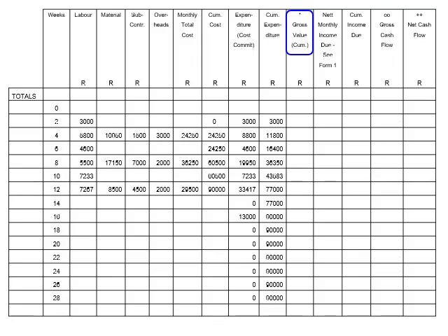The cumulative gross value calculation uses cumulative monthly cost and the contractor's profit margin. Calculating the amount to be recorded in the cumulative gross value column is very easy. All we need to do is add the percentage profit, stipulated as 10% on cost, in the exercise brief. The method used for this calculation involves simply adding 10% as a fraction to the cumulative monthly cost.